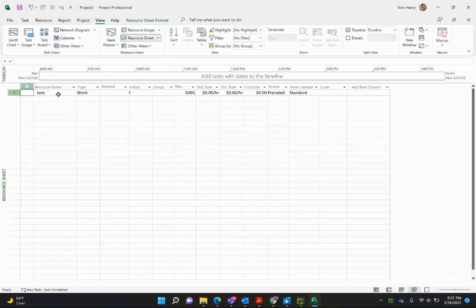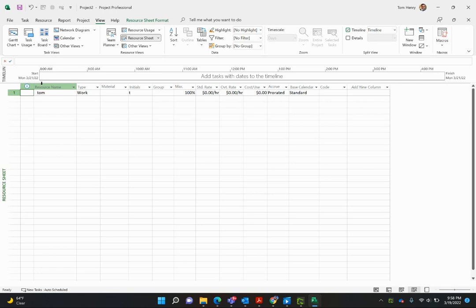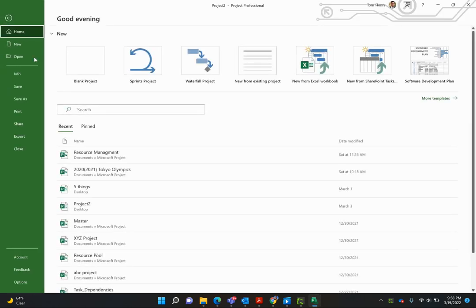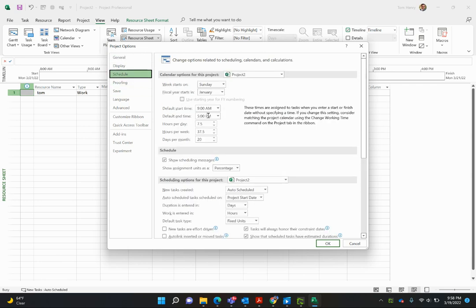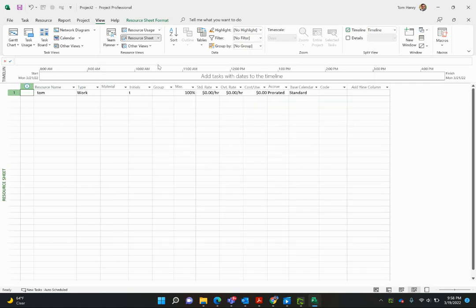Why is that? Well, when you assign a resource, they will be assigned to the standard calendar. And we set the working hours as a day is 7.5. So when we set a day is 7.5 in the project options, when you put someone in as a day, Microsoft Project knows that's 7.5. However, there's a trick here. Don't be fooled.